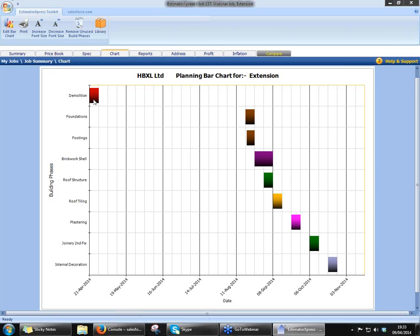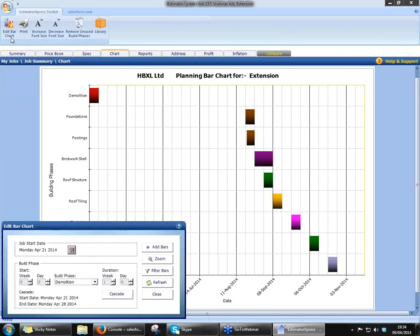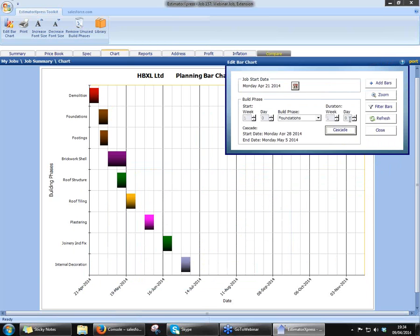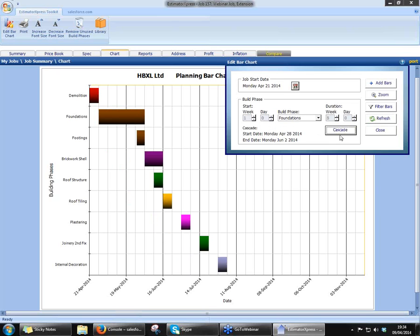The only thing I need to do — we've got the demolition work there, which is the hacking off a plaster. We're not going to wait six months before we do the foundations. To bring the foundations back in line with the demolition work, go to Edit Bar Chart at the top there. Make sure you've got the foundation highlighted, go to Start Week and just bring that back to zero or week one. Click on Cascade, and that's moved all your other jobs along, including your handover date. You can do the same with the duration — say for instance typical British weather, the site's been flooded out, all your foundations up to three foot of water. Take your duration of your foundations up to maybe four or five weeks — click Cascade and it's moved everything along accordingly. It can be really handy to show to Mrs. Bloggs to say, look, you chose to change your mind on the type of tile, I've now got to import those over from Spain — that means it's going to be another three weeks before your job's completed.